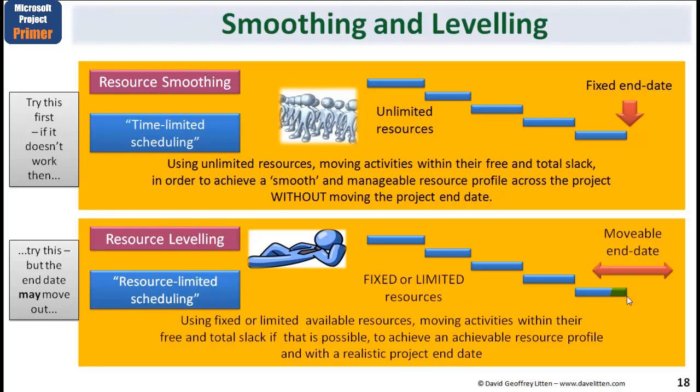Now this is important, you understand both these concepts. Often management will say, no, we need this end date, but we do have limited resources. Well, that isn't always possible. What you're doing for management here is finding a realistic end date given limited resources. If they don't like that, then you would say, all right, if to keep this end date, here's the amount of resources we actually need to make this an achievable plan. So be aware of these 2 terms, and we'll be using those in later modules.